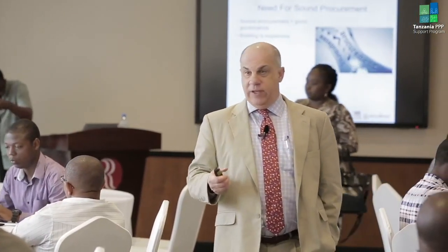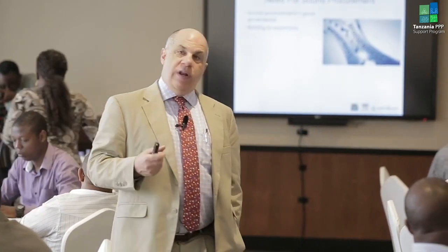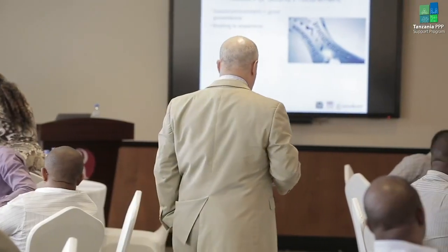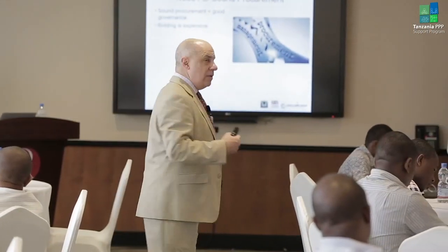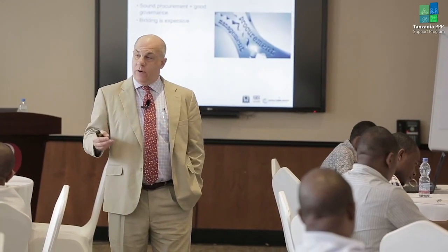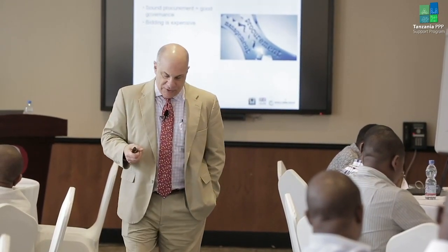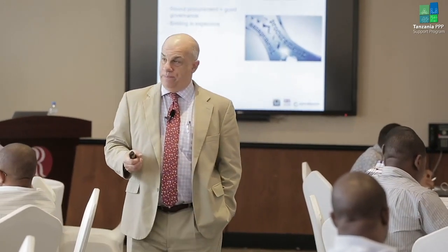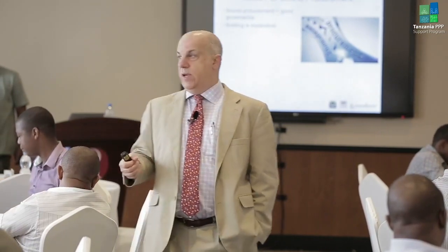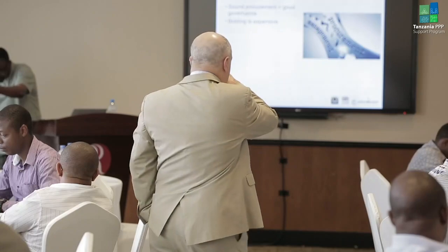to engage an architect, an engineer. They're going to have to engage lawyers, financial experts. They're going to have to do a lot of work, planners. They have to put a lot of work into these proposals. So if you want them to compete for it, you want to attract them to your project, they don't want to be in a project where the procurement is sloppy, okay? They want a tight procurement, sticking to schedules, open and transparent, as was said here.